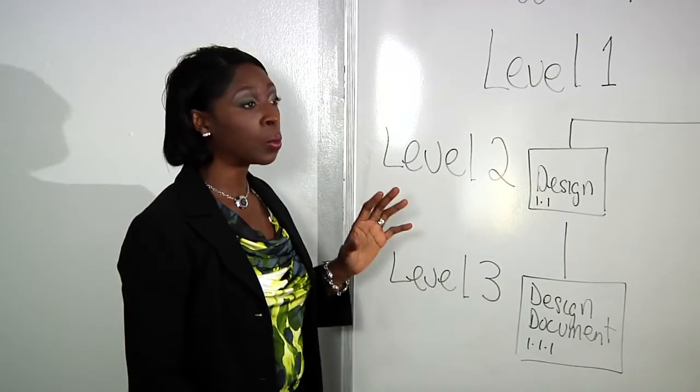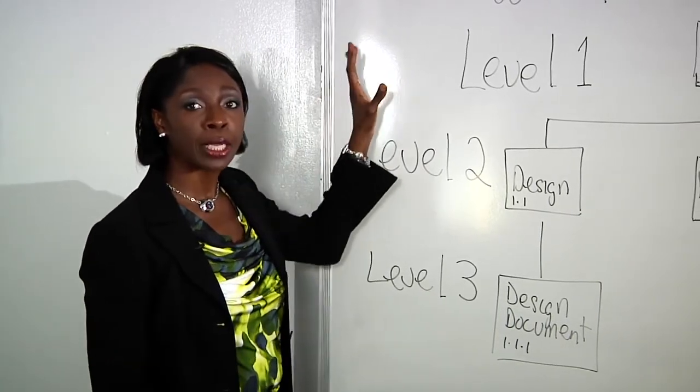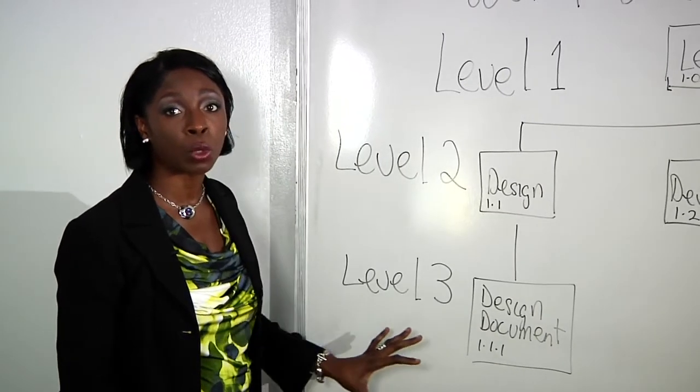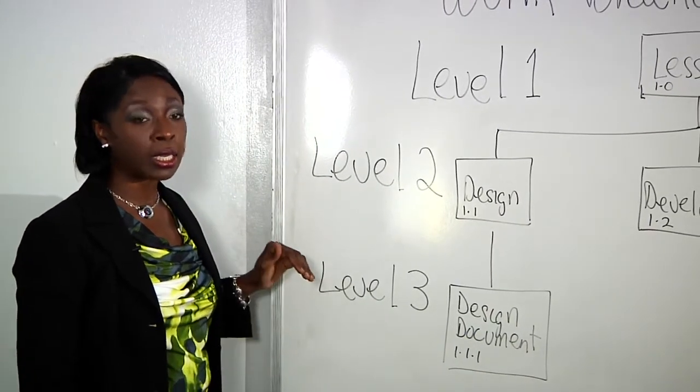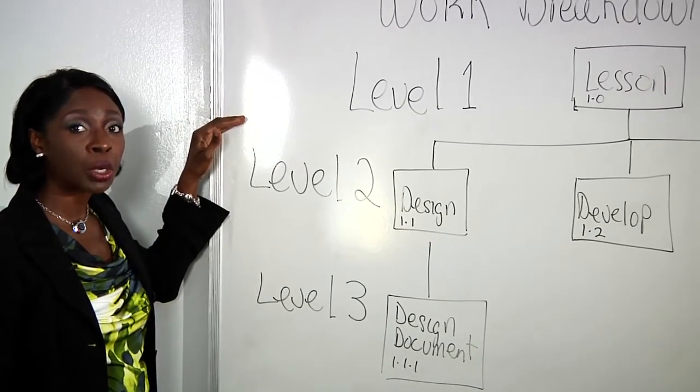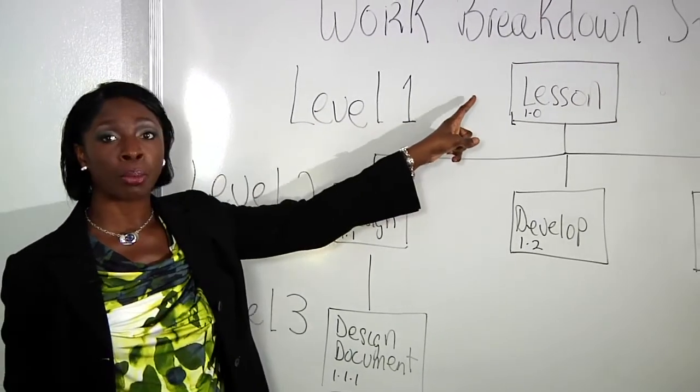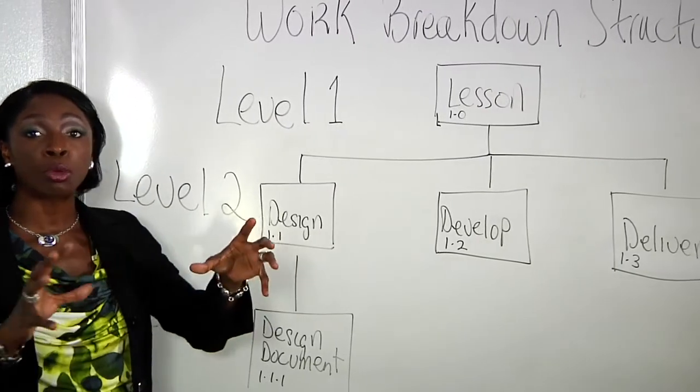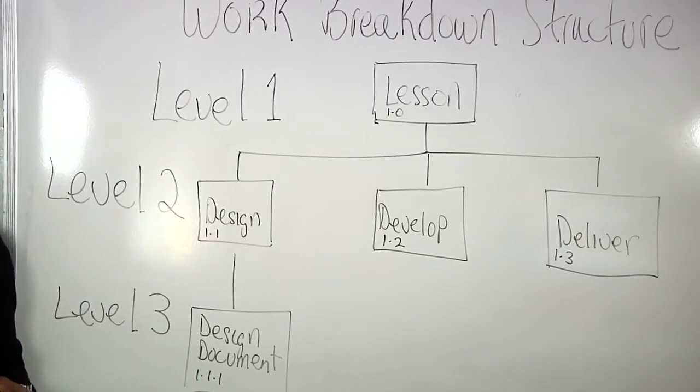This means that no more than 100% of the project scope can be included in the top level of the work breakdown structure. The work breakdown structure represents 100% of the work of the project. Collectively, all levels of the work breakdown structure roll up into the top such that 100% of the project work is captured.